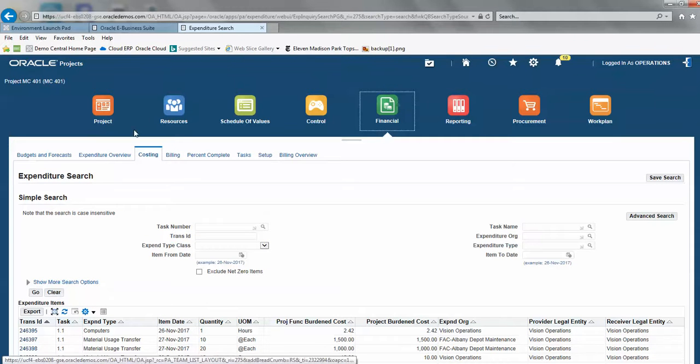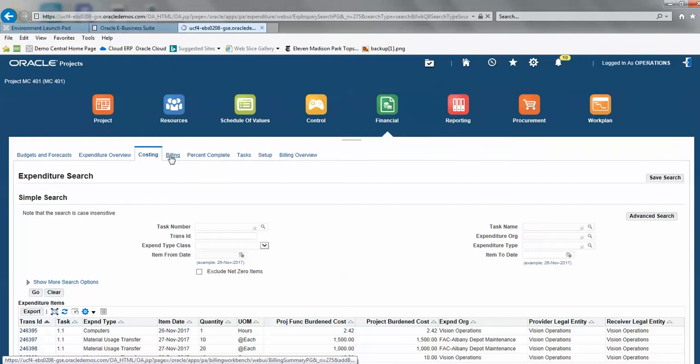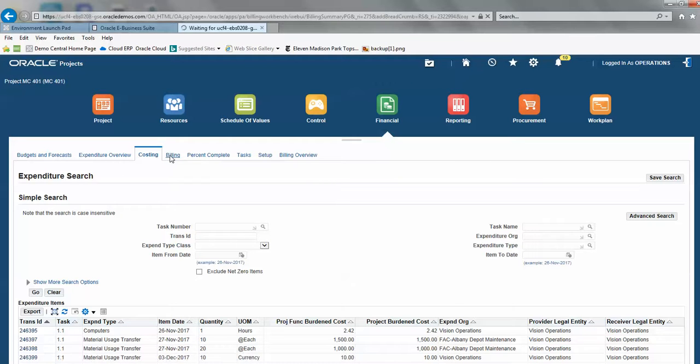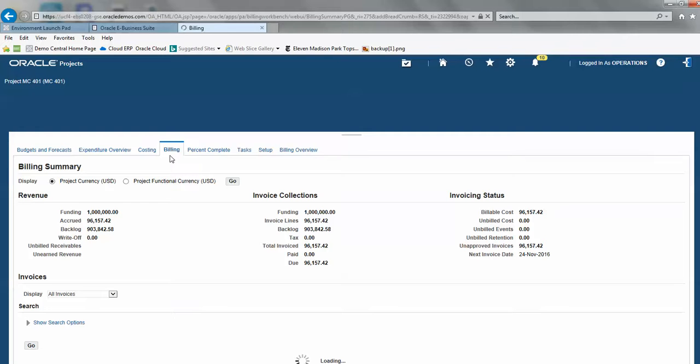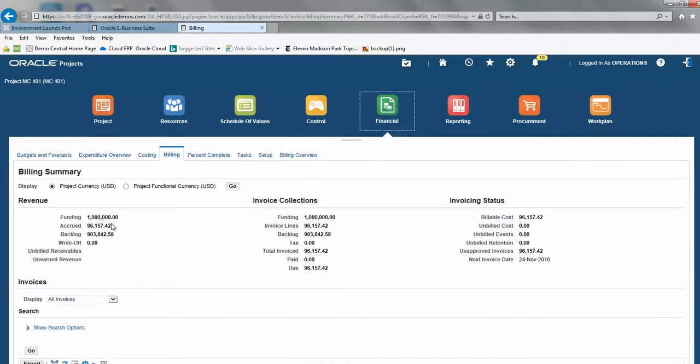And then go into billing, and then we could look at our billing. You can see here, we've taken all of these costs. We've got our funding and we've used 96,000 of that, giving us basically 903,000 left, right?